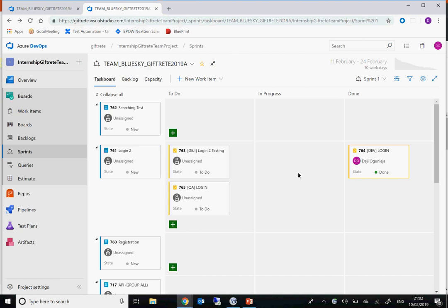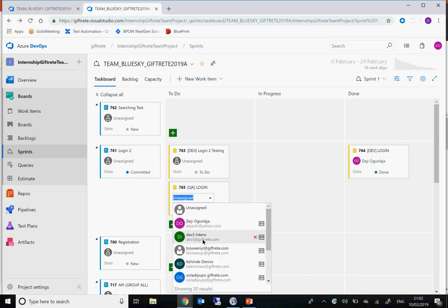However, there are different states right now. There's a state for the task and a state for the story. Because this story is already started, it's going to be in committed. And that's another thing I say about sprints. In a sprint, you commit to do things, and everything that you commit to do within that sprint has to be done. It's very, very important. So now, the developer has done this, and now testing will start.